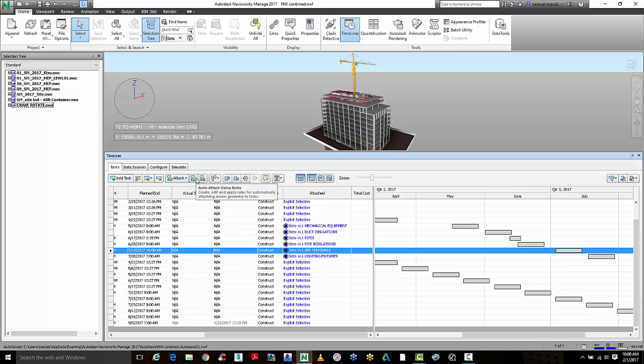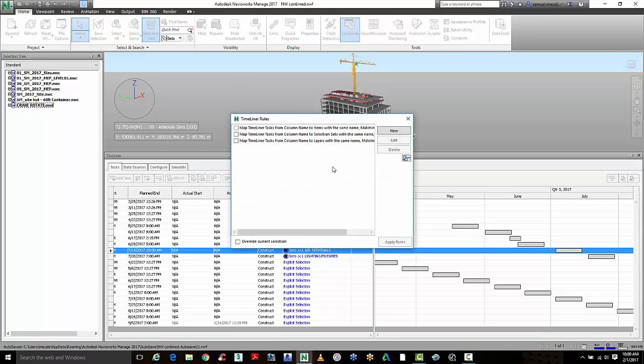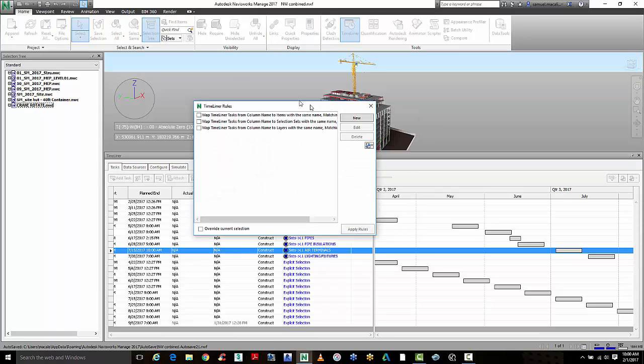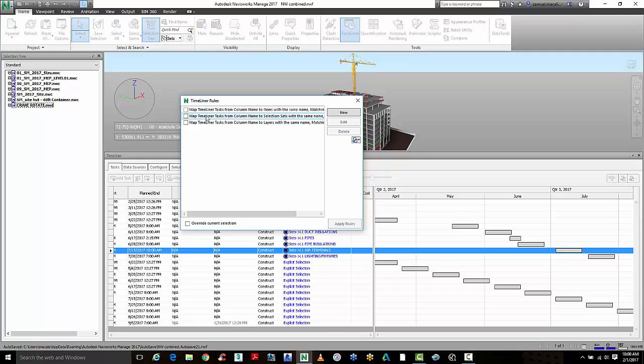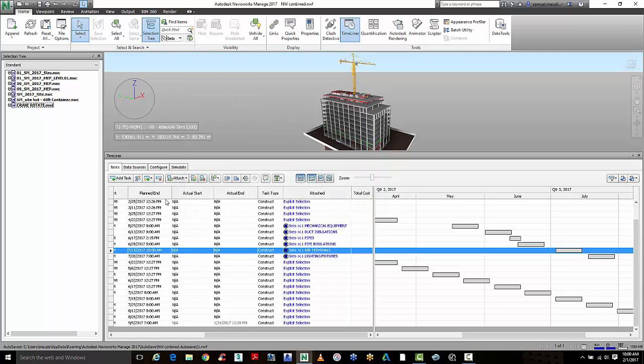There are some powerful tools here, like auto-attach using rules, which will allow you to map Timeliner tasks to either items or selection sets. Or we can manually go through this and attach it to an explicit selection via the selection tree here.